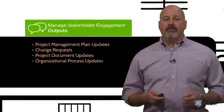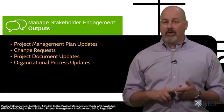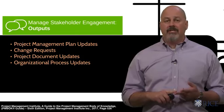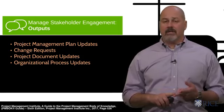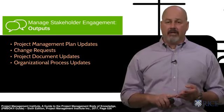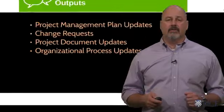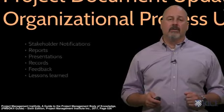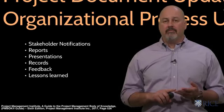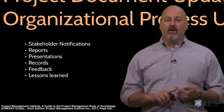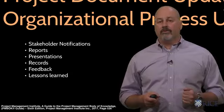The outputs of your managed stakeholder engagement process should be updates to your overall project management plan, any change requests made by your stakeholders during this process, updates to any other documents, and anything required internally to the organization. This can include reports, presentations, updating progress, feedback, or lessons learned — anything that can be recorded for current or future use.